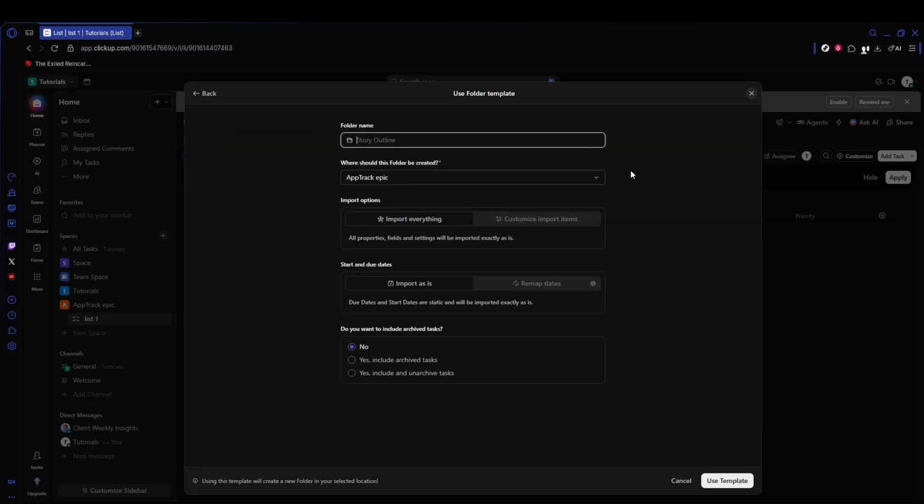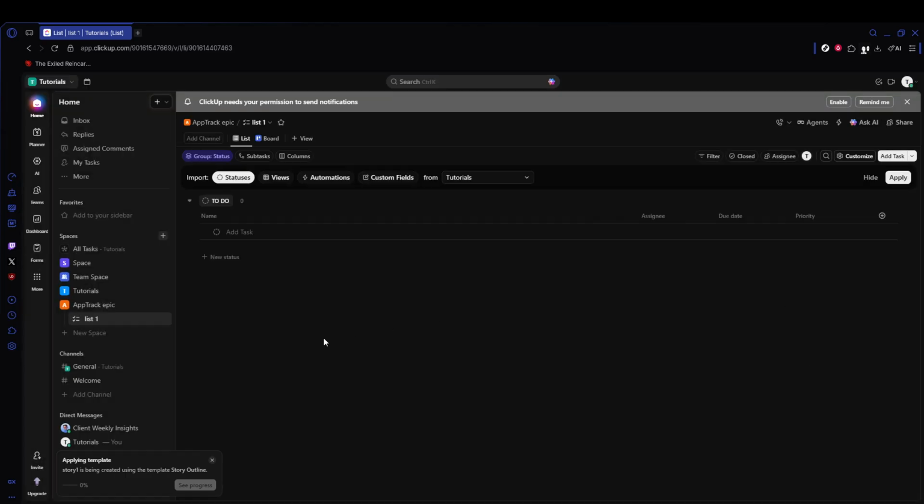Open that task and fill in the key sections the template provides, such as description, who, what, why, business impact, and acceptance criteria. Be specific and concise so the work is easy to understand and easy to validate when it's done. Repeat this process to create additional user stories, each one representing a small, achievable piece of work that pushes